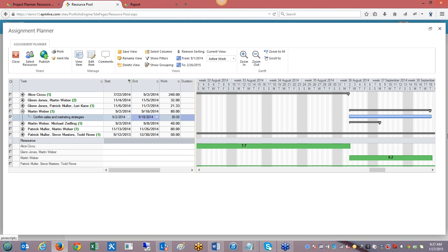If I do hit the publish button, any changes I made, it will try to make those changes, but what it'll do is if it's impacting any project schedules, if it's a task in a project schedule basically, it'll first notify that project manager and say, hey, this task is being requested to be extended by 2 weeks when it was originally planned for 1 week, and they can approve or reject that and then comment back, and we can try to figure out a way to resolve this issue. Maybe we need to get someone else to help, those types of things.